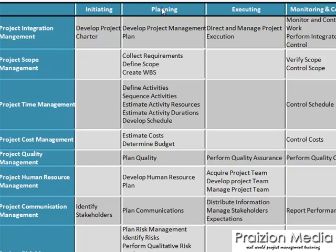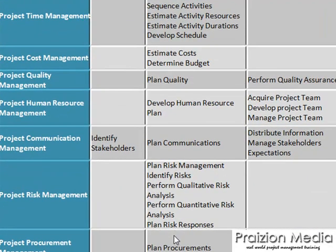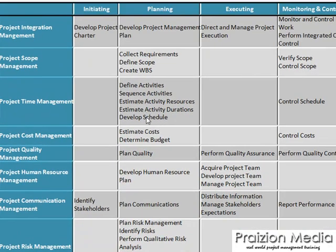It's not uncommon for several processes in planning to be done simultaneously in parallel by different teams. You could have one team working on the scope, another team working on the schedule, and other teams working on procurements. I've been in projects where the procurement team is working on what needs to be purchased, getting inputs from people planning the time aspect and the scope aspect. That doesn't mean it's the same team doing everything as far as planning goes. Also, in order to effectively plan for cost, you need to know the potential risks, the potential resources working on the project, and you also need to be aware of quality.